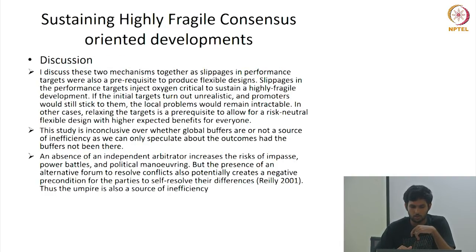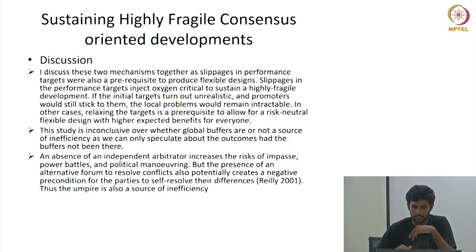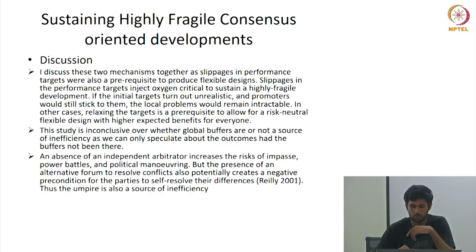Slippages in performance targets were also precursors to producing flexible design. Slippages in performance targets inject oxygen critical to sustaining a highly fragile development. If initial targets turn out to be unrealistic and the promoter sticks to them, local problems would remain intractable. In other cases, relaxing targets is a prerequisite to allow for a risk-neutral flexible design with higher expected benefits for everyone. However, the absence of an independent arbitrator increases the risk of power battles, while the presence of an umpire also potentially creates a negative precondition for parties to self-resolve — thus umpires are also a source of inefficiency.